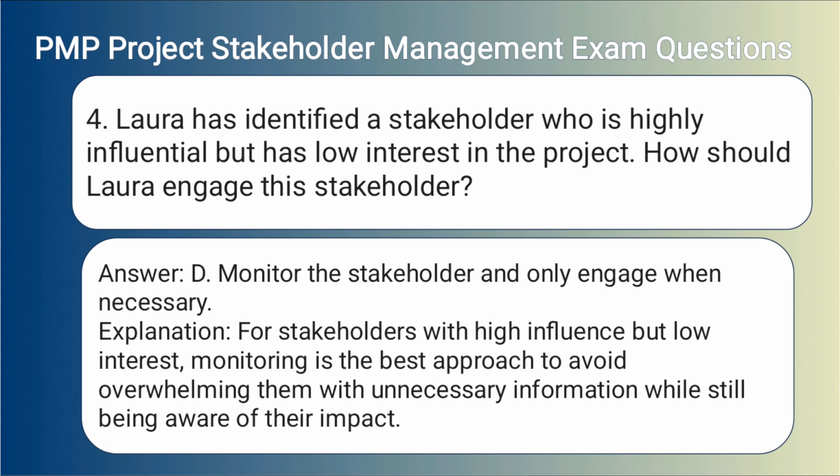Answer: D. Monitor the stakeholder and only engage when necessary. Explanation: For stakeholders with high influence but low interest, monitoring is the best approach to avoid overwhelming them with unnecessary information while still being aware of their impact.